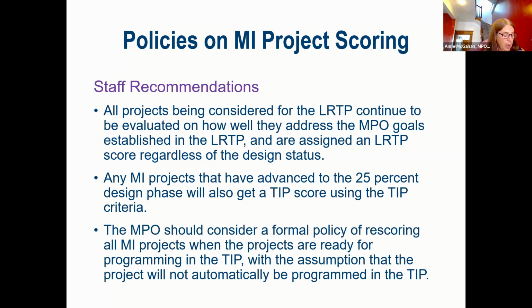At this point, the MPO can review whether it is appropriate to program the projects in the TIP because the costs may have increased since inclusion in the LRTP, and a second evaluation gives the MPO an opportunity to reevaluate the project in relation to a cost increase and the MPO's goals and objectives.